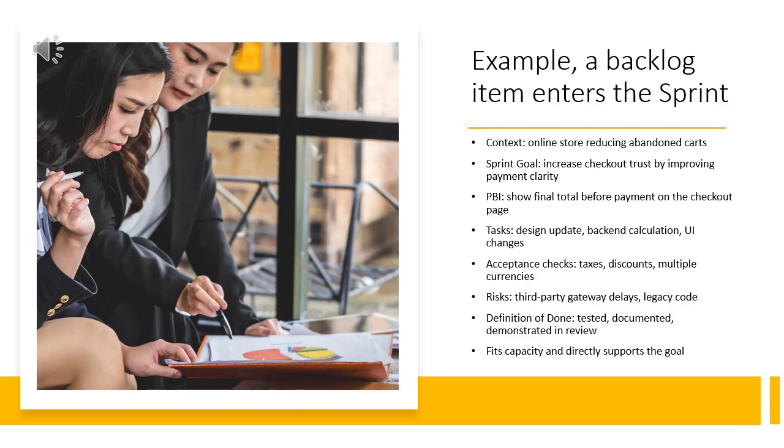Consider an online store aiming to reduce abandoned carts. The sprint goal is increase checkout trust by improving payment clarity. A product backlog item reads, show final total before payment on checkout page. The team slices and plans it.